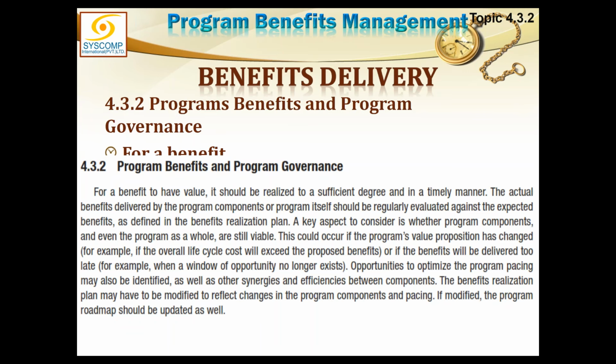This could also occur if, for example, the overall life cycle cost will exceed the proposed benefit. So it remains a cost benefit analysis, because if the benefits are less and cost is more, this is financially not feasible. Or if the benefits will be delivered too late, that is also not acceptable.